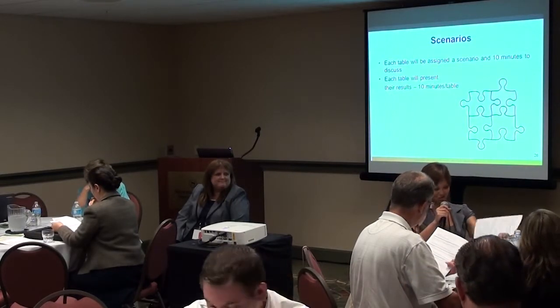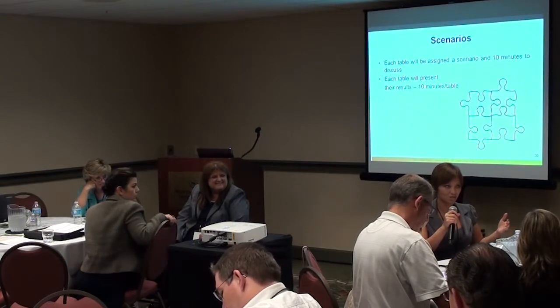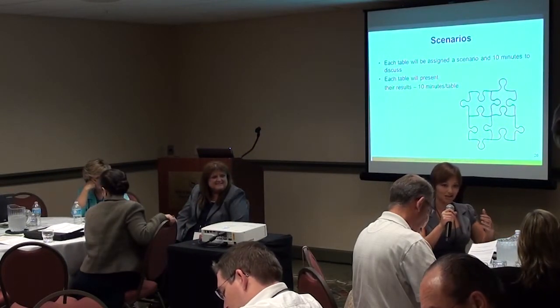So when we were reading through the different scenarios, it looked like a lot of things went wrong, but we'll just focus on some of them. One of the things we noticed was that they didn't really engage all the stakeholders. They used the subject matter experts as their business analysts, and it's good to involve your SMEs, but it's also important that you involve other people, other subject matter experts, because when you're focused on your own job, you tend to forget that when you hand things off to other people, they also have other things they do with it that you may not know of.